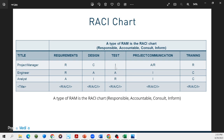Who should be informed? The analyst. When it comes to testing, we can see the engineer is ultimately answerable, the analyst is one of the doers, and the project manager should be informed. When it comes to project communication, here we can see an A and an R. Is this allowed? Absolutely. It is allowed that we have a responsible person also being accountable. However, where possible, we would prefer you allocate the job to someone else. If it's not possible, we could have an A and an R.